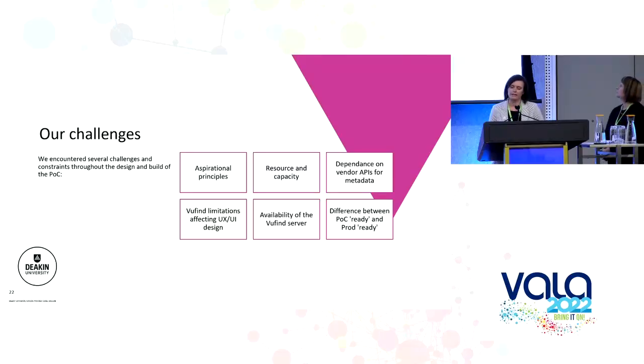We also recognise that not testing with real users throughout the prototype's development means that delivering on the principles around universal design, intuitive search process and user-driven interfaces is somewhat limited in terms of practical user validation. The availability and capacity of project team staff often created blocks to progress. So whilst this was an accepted project risk, it was far more impactful than we originally expected.